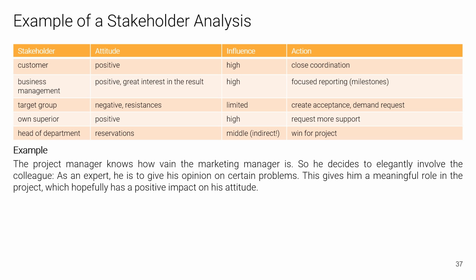Or let's look at the second example below. The project manager knows how vain the marketing manager is, so he decides to elegantly involve the colleague. As an expert, he is to give his opinion on certain problems. This gives him a meaningful role in the project, which hopefully has a positive impact on his attitude.